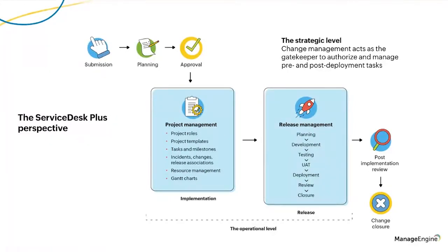So, in this pre-deployment phase, change management acts as the gatekeeper. It ensures that the change is recorded in the system, it undergoes an elaborate planning phase, and is authorized by the change advisory board. The next step is to implement it.